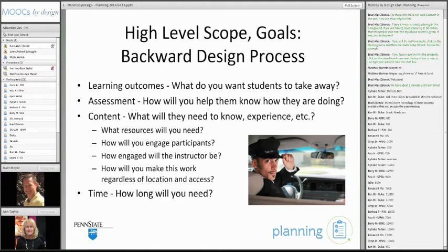We also knew, looking at the players involved and the kind of MOOC we were going to develop, that we were going to need more time to develop the Energy MOOC than we were the MAPS MOOC. Not only because of the kinds of things we were going to be developing, but the people involved and when they were even available.